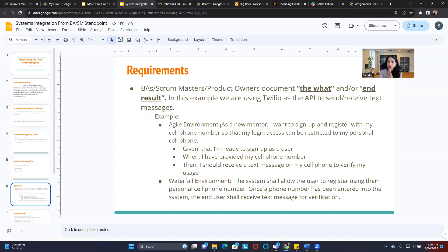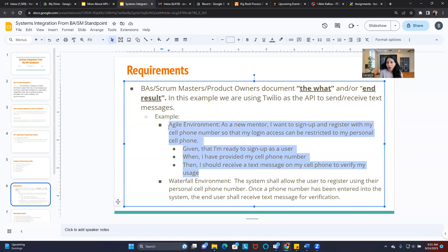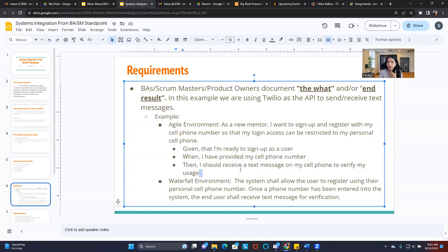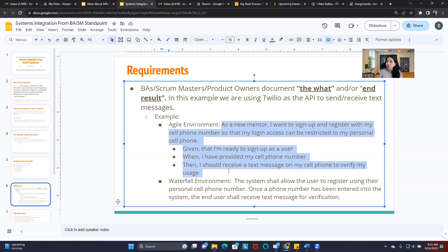So let's go. As a mentor, I want to sign up and register my cell phone number so that my login access can be restricted to my personal cell phone number. Given that I'm ready to sign up as a user when I provide my cell phone, then I should receive a text message on my cell phone to verify my usage. Here, we didn't talk about Twilio as an API. We didn't specify Twilio or API calls or API keys or any of that information. We just provided what is needed from a user standpoint.